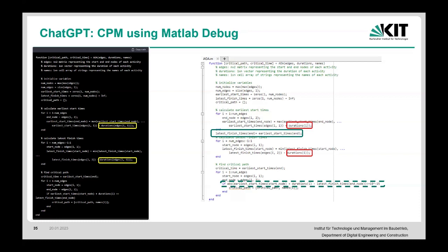Or your earliest finish is equal to your latest finish, right? However, because you have round-off error with these distributions, this by itself would likely not be the same because you have 0.000, you have numerically, you're basically extracting that. So it requires some sort of tolerance there.